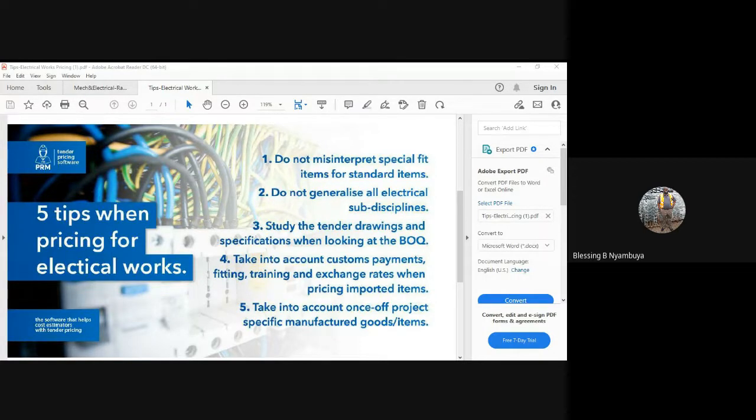You go on, you price that BOQ, and items that were supposed to be given correct prices were priced wrongly. Even from the engineering part, from the consulting part, there were certain prices that would not meet. We discovered now that some of the items that we needed for that project were supposed to be imported from Canada, right? So the whole project was actually underquoted.